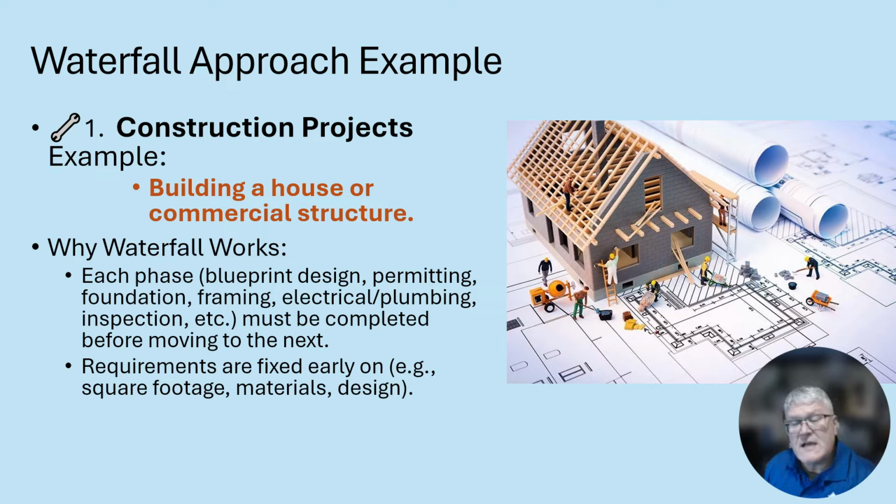So the first one, as I talked about before, is construction projects. For instance, building a house or a commercial structure. Why waterfall works here: each phase you'll have blueprint, the design, permitting, building of the foundation, framing of the structure, then you'll put in the electrical, the plumbing, do the drywalling or finishing the walls, then you'll have inspection, and they must be completed in order before you can move on to the next phase.